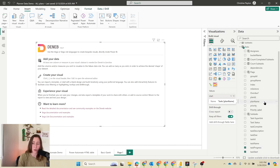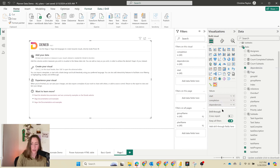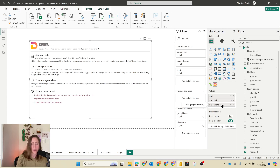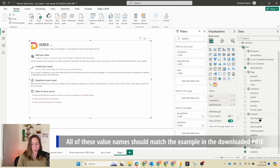Next we need completion. Completion is not completed date — it is task progress, the percent complete, and it's out of a hundred. So if your number isn't out of a hundred, multiply it by a hundred first. I'm going to name that 'completion'. The assignee column is optional, by the way, it's not required. Next up is dependencies — dependencies is an optional field. If you don't have dependencies, which will be the case if you're working with planner data from the non-premium planner, you can skip this one. It's comma-separated task IDs that depend on each other, and it'll connect the bars with a line in the visual.